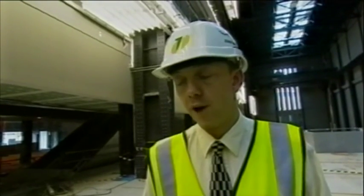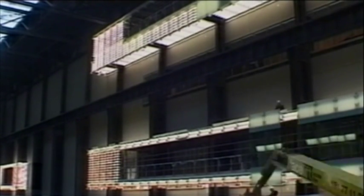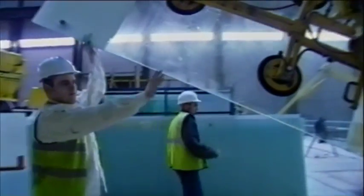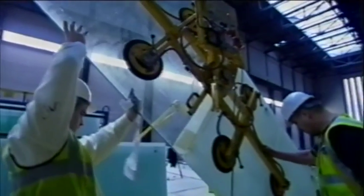Herzogs are happy, Peter's happy, and I'm confident that when it's up, it'll look an awful lot better than the original samples that were approved way, way back. So, a year later than originally scheduled, Boog begins putting the well-travelled and treated glass on these enormous balconies on levels 3 and 5. The clear section is the viewing window, and the translucent ends cover the lights.